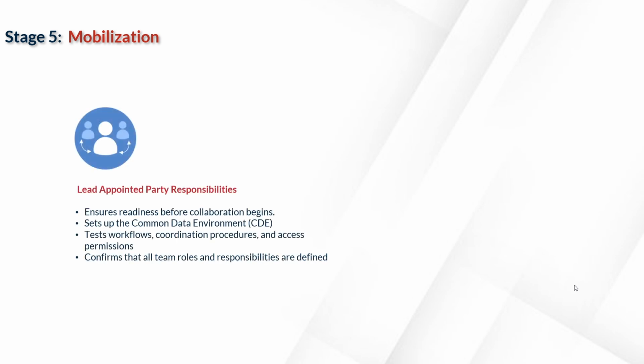Stage 5 is the mobilization stage, which marks the final preparation before the actual modeling and information production begins. At this stage, the lead appointed party ensures that the common data environment is in place, workflows are tested, and everyone knows their roles and responsibilities.